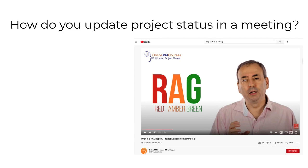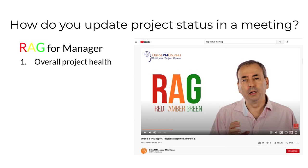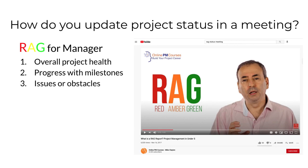If the Sous Chef team leader had a status meeting with his IBM manager, he'd probably begin with what's called a RAG — which stands for Red, Amber, Green, the colors of a traffic light. The team leader would begin with a statement like: 'Sous Chef development is currently amber. As long as we get our speech recognition expert from Tokyo to Boston by the beginning of next week, I anticipate returning to green status.' He begins with a color because his manager expects to hear that anytime the schedule is going to be pushed back one week. No one in management likes surprises. It's the manager's job to solve issues and remove obstacles so a project is completed on time and on budget. In the status meeting, the team leader would also talk about progress against milestones and any issues or obstacles.